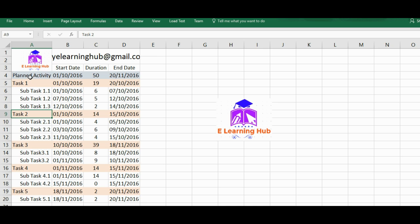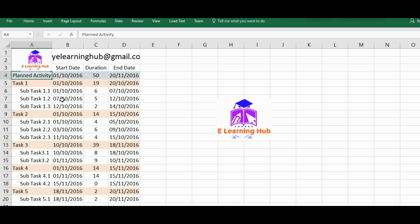These are the activities that I have listed. These are the generic names, tasks and sub tasks, and this planned activity is the overall activity that we need to complete. So before starting with the Gantt chart, what's the requirement that we need to have? The list of activities that need to be completed.